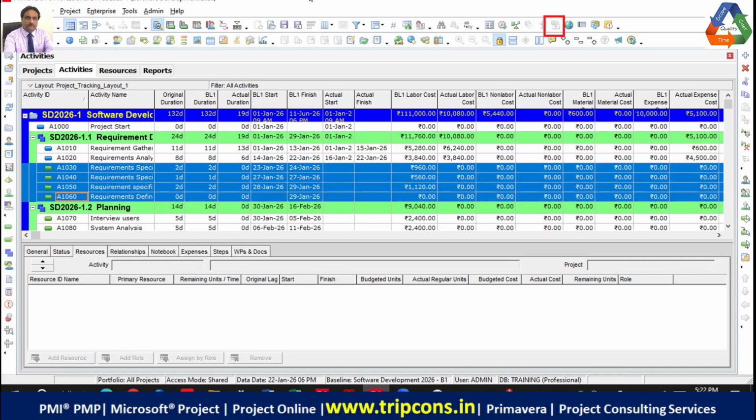Faith, did you notice that? Yes. This button is disabled because Oracle says that if you're not looking at your Gantt chart, there is a good possibility that you might update it wrongly, so they prevent you from updating it. You just switch on the Gantt chart and you will see that this button is activated.